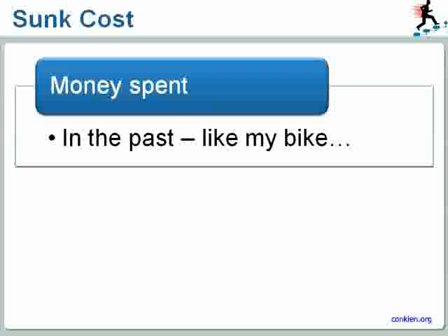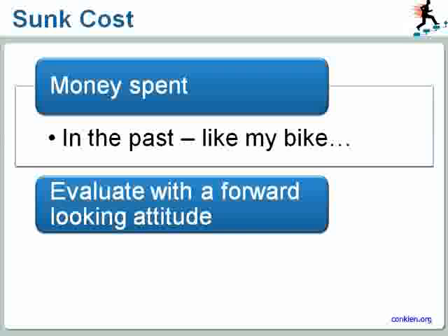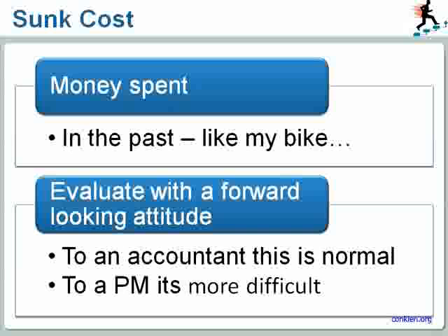And it is the same thing with the sunk cost on our projects. Don't look back, look forward, and that is much more difficult to do than it sounds. Just think about it. If you have already spent $500,000 and you need to invest another $200,000, but you also know that you will only get back a profit of about $400,000, well, should you still move forward?